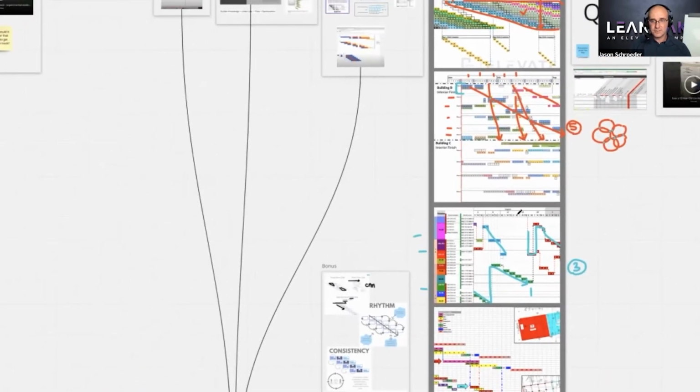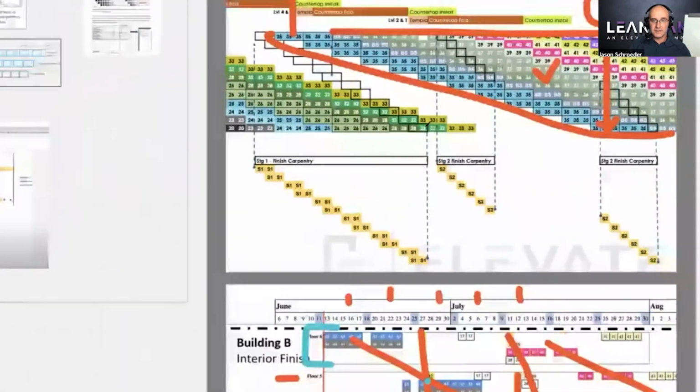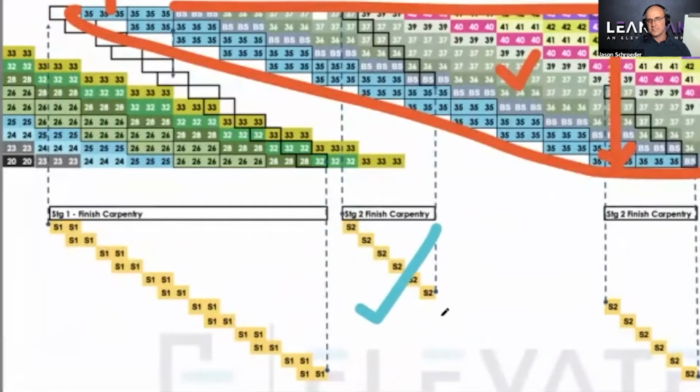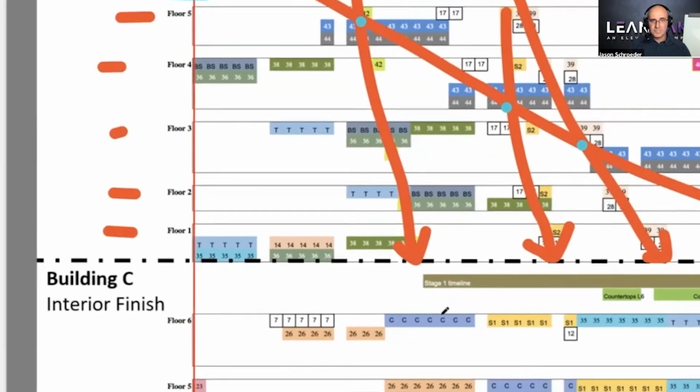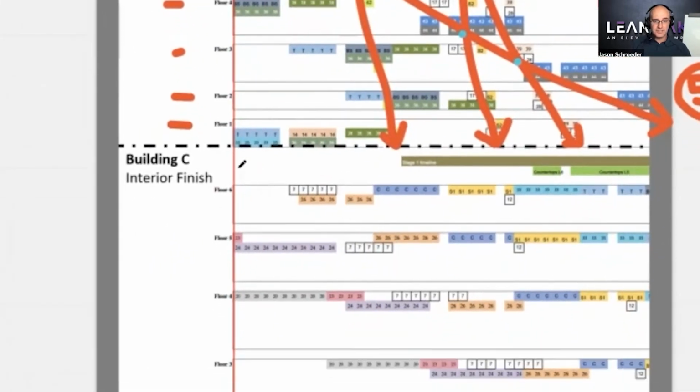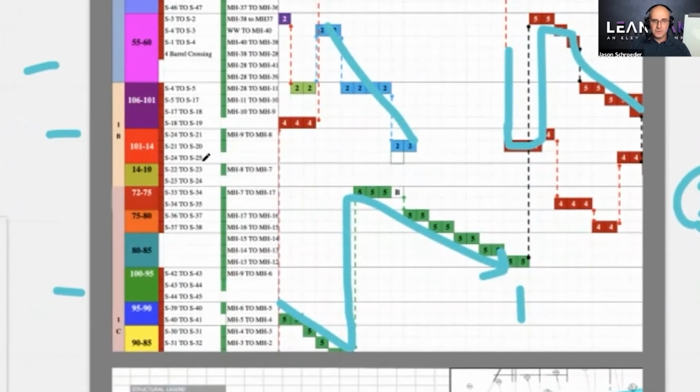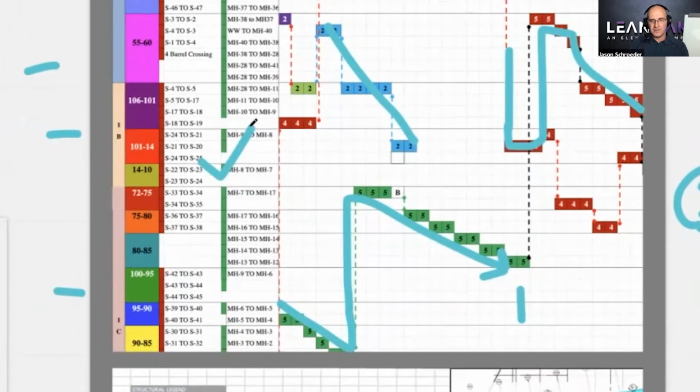That enables us to open up our world to where we can, and here's the point, we can schedule consistent buildings like high rises, bed towers, research laboratories, data centers. We can schedule really detailed finished projects on really high-end complex projects with multi-train takt planning. We can schedule civil because we know that the storm drain, the storm sewer, the water, and the paving are all different trains. We can schedule that. The most important thing is to have it broken out by zone.